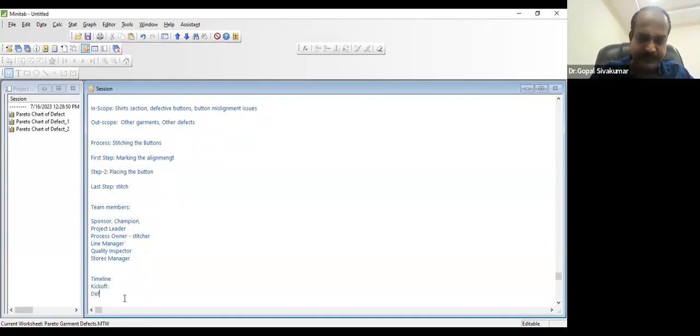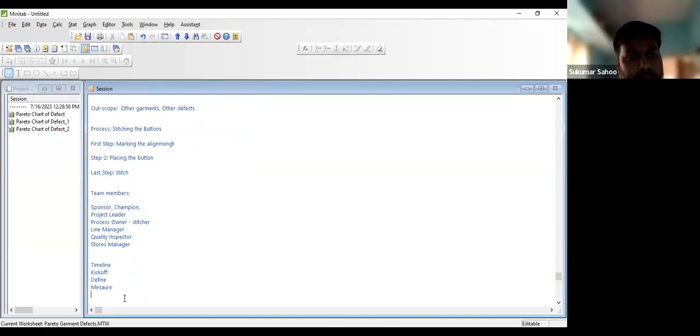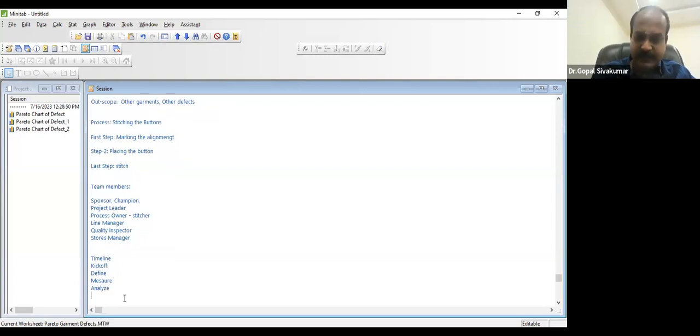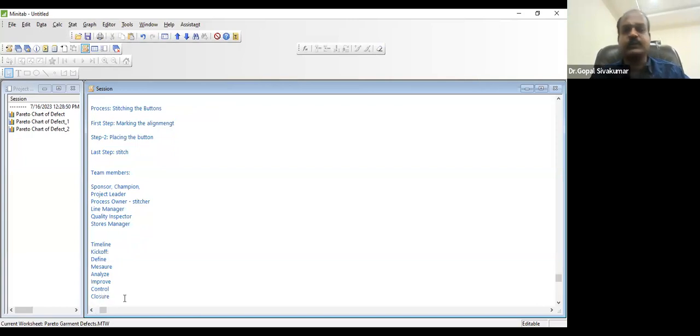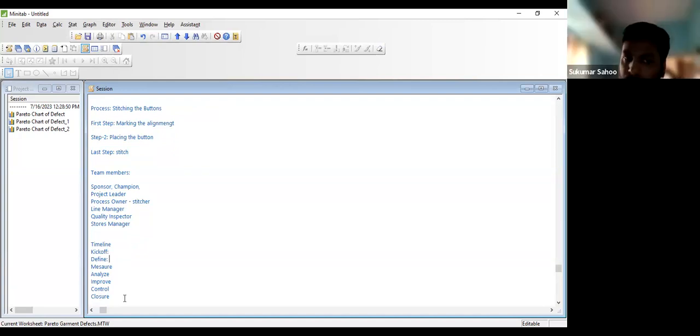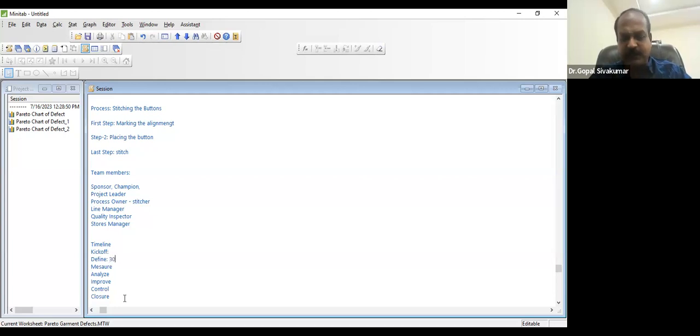Kickoff date, define, measure, analyze, improve, control, and then closure. That's all. Now tell me, maybe kickoff date. You already started discussing about this particular project. When the project charter will get approved, how many days it might require for you to collect all the data and all those things? So far, we have written so many things based on the availability of the data. All right. So for define phase, can I write 1 month enough?